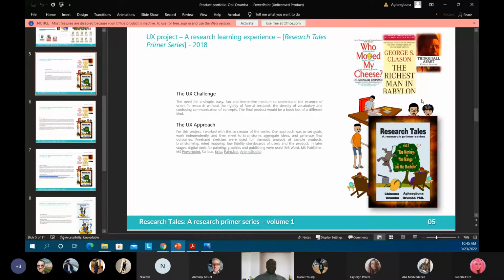That we have students who have these, staff members who have those sorts of needs. So all of these things, I'm bringing them into what I'm doing now. It's a big challenge selling all of those things. But if you map out who you're selling to at any point in time, it makes it easier. Part of mapping your project stages to key stakeholders is that it also enables you to know the sort of information you need to feed them in a timely fashion to prime them, prepare them to face the design decisions that you're going to